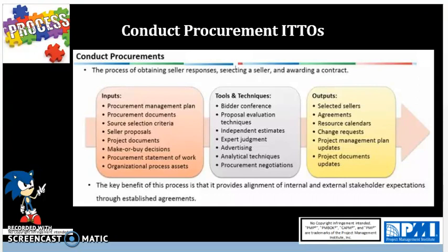So once you have evaluated all your criteria, then you would have already taken a decision as a team to select a seller or a bunch of sellers to provide specific services for the project, and in turn you would have awarded a contract or agreement which consists of statement of work, deliverables to be given out from the vendor, schedule baseline, performance reporting, periods of performance, roles and responsibilities, seller's place of performance, pricing, payment terms, place of delivery, inspection, and acceptance criteria.